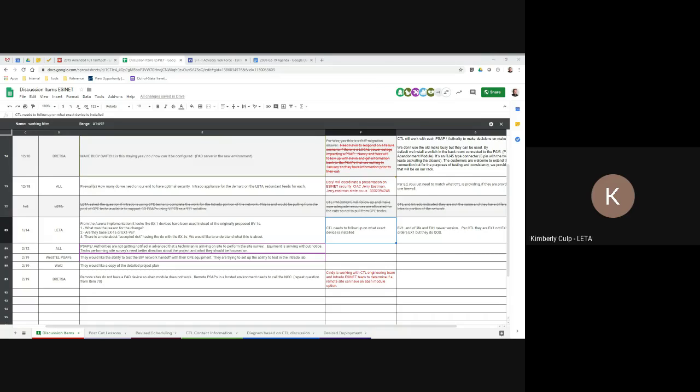So for the emails and communication, what we've put out to all of the PSAP authorities is that you should be establishing an email group that you want these 5 people to be communicated with, these 3 people, etc. And then our expectation, CenturyLink, is that you will communicate to that group and you'll be communicating all pieces of the project. And then in return, we need to be doing the same.